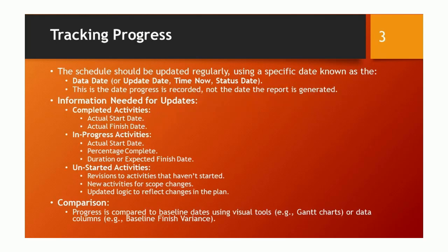The schedule should be updated regularly, using a specific date known as the data date, or update date, time now, or status date. This is the date progress is recorded, not the date the report is generated.